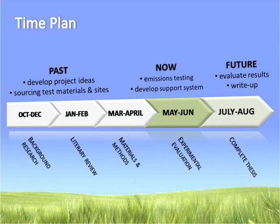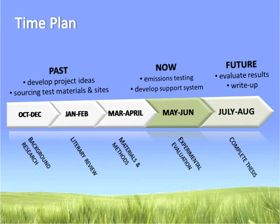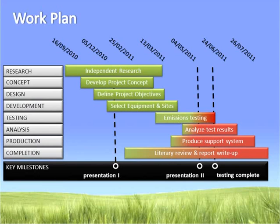Next, we're going to look at the time plan for this project. The project began in October. From October to February, I began independent research and selected my project, and also started my literary review. Then from March until June, I arranged the on-site testing dates, began testing and started using the software for developing the support system. From July until August, I'm going to complete testing and then complete writing up my thesis. I've also translated the time plan into a more detailed work plan by creating a Gantt chart to help me manage my time better and keep me focused on getting the tasks done.